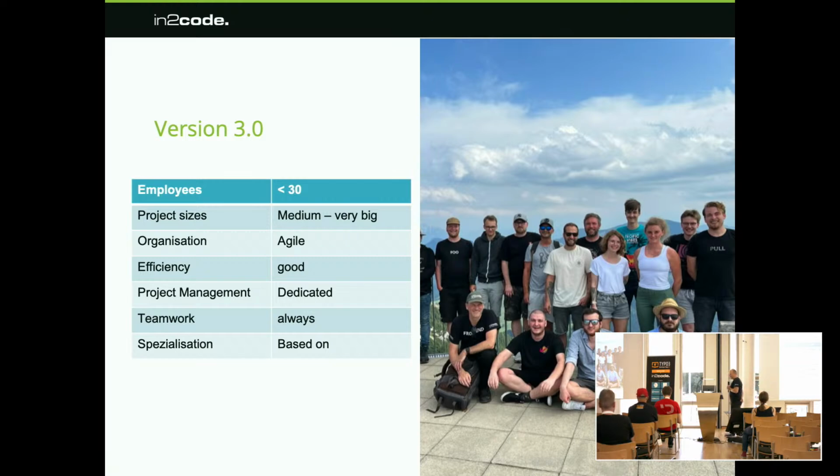In the end, we found out that Scrum is not the right answer for us, because Scrum, if you think of it as a toolbox, is very, very good if you have a team which can dedicate itself to work for a very long phase on one project. So if your client has millions of euros, and you can have a perfect Scrum team with 6 to 8 developers and let them run one full year, it's perfect.